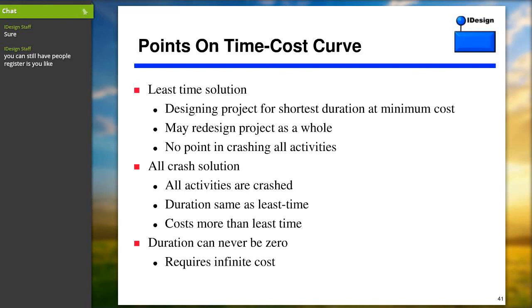Should all activities be crashed? No. Are all activities the same? No. You only crash activities that give you the best bang for the buck. If I were just to assign one more tester over here, the whole thing is cut by half or whatever. You want to look for the best return on investment here. So pick the best candidate on the critical path and you crash that one.